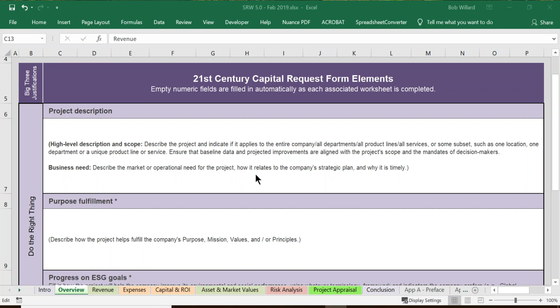If a normal retrofit has already been planned and cost justified, then you just need to create the business case for the additional cost of attaining a green building standard like LEED Gold for existing buildings. So if the scope of your project is different from the original project, then you really want to make sure that you frame it in a way that you can size the benefits that you require in order to offset whatever additional costs are required. So you need to be kind of clear on the scope of what it is that you're actually doing.